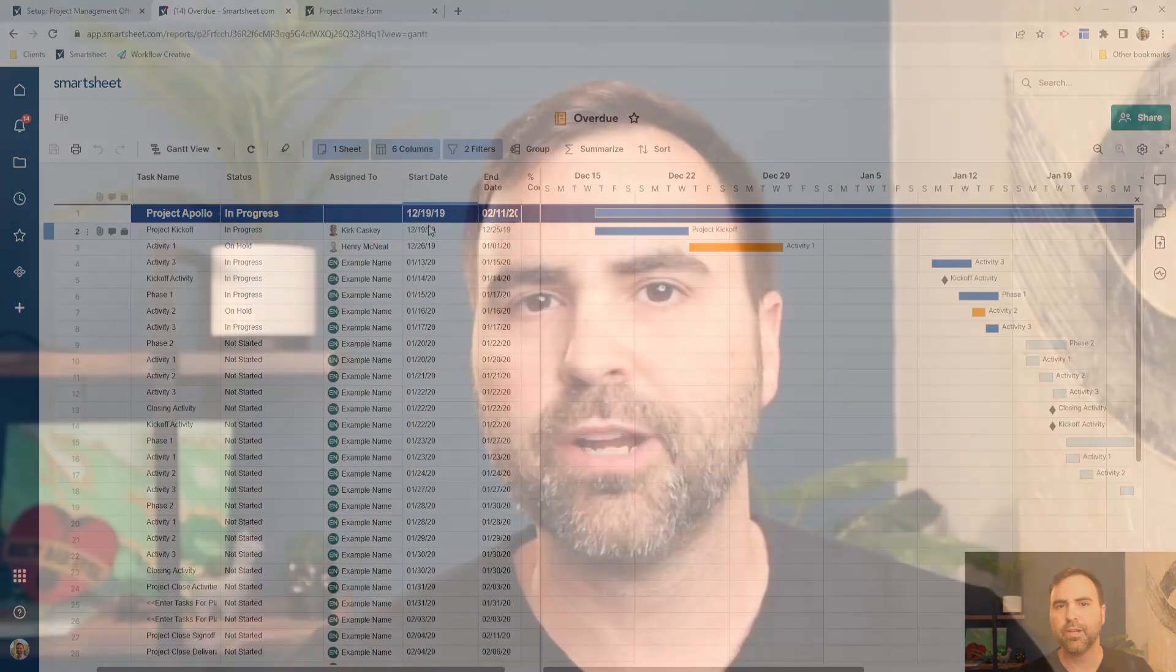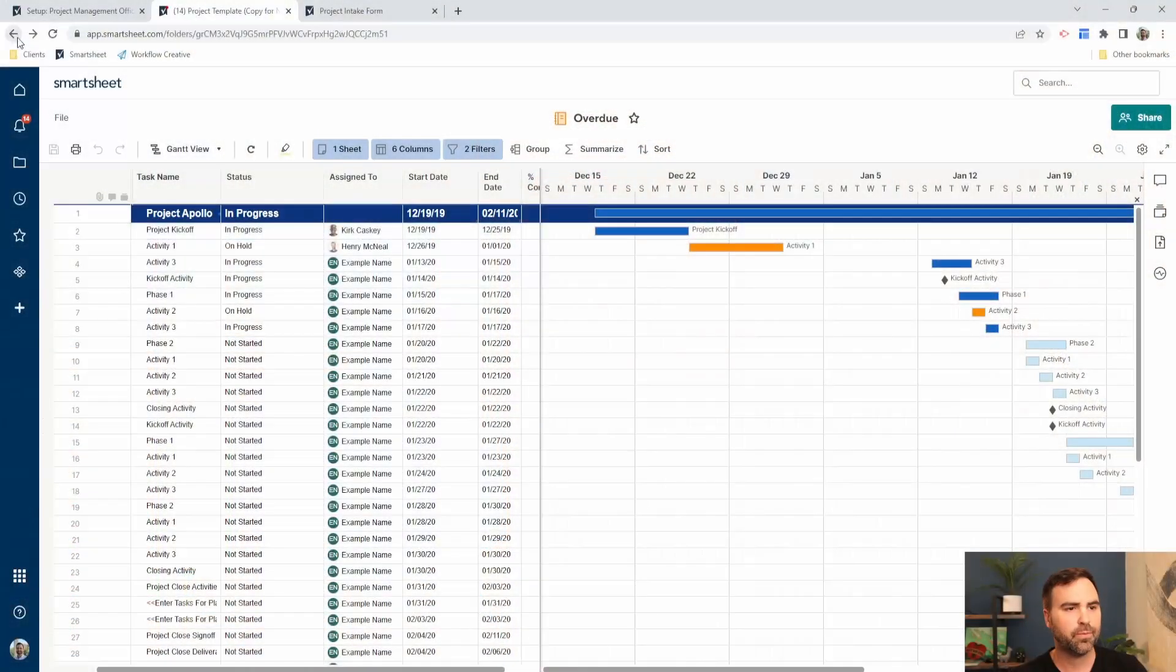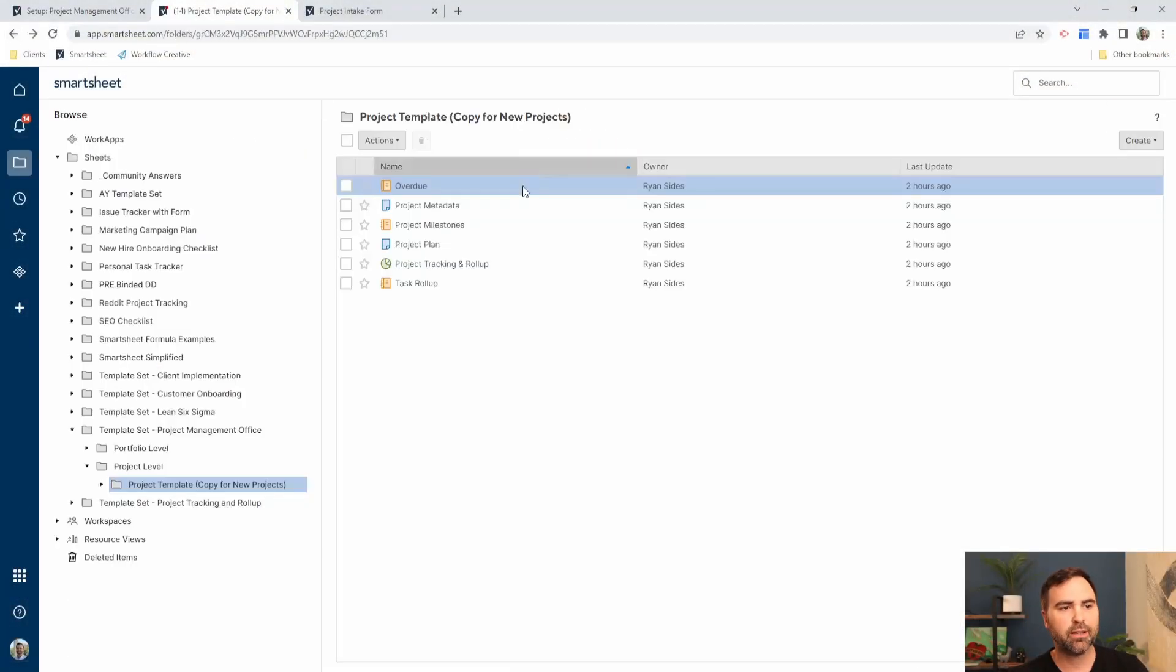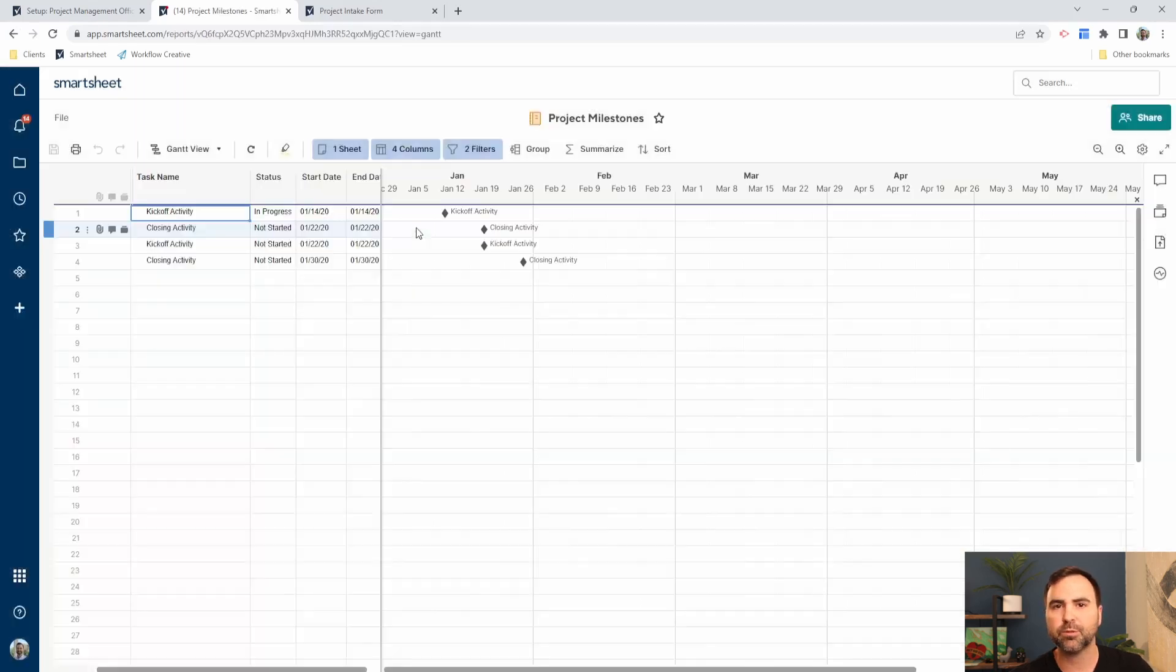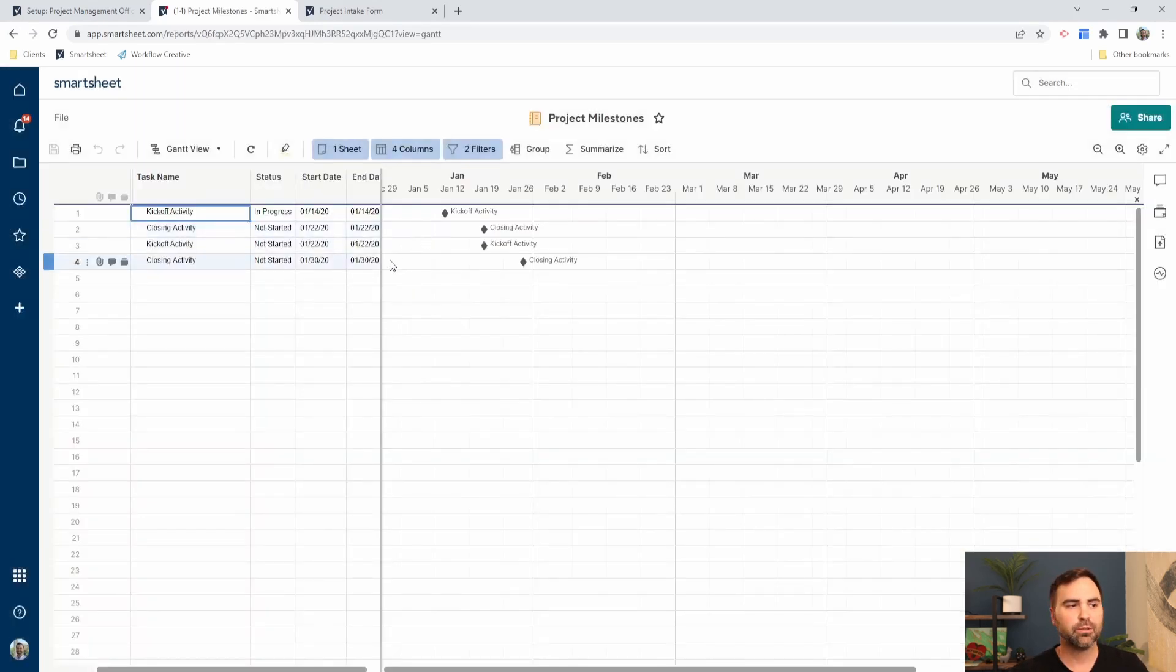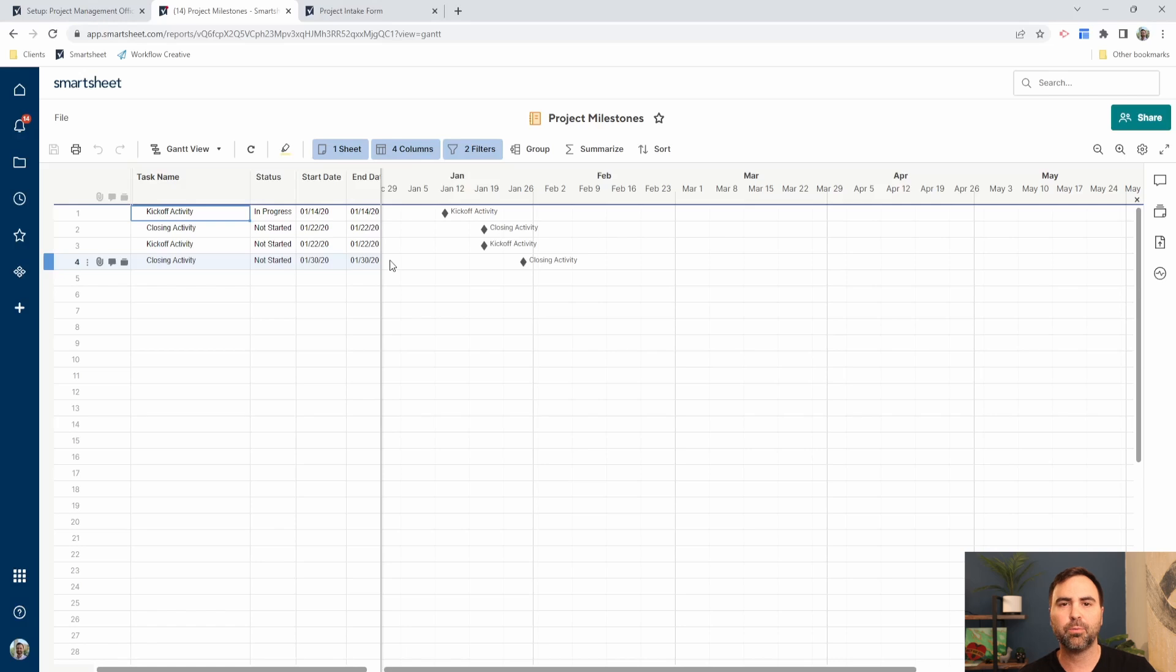Reports are great because you can customize reports for certain audiences or for certain people and show them the data that they need to see without them diving into the project plan, without getting them lost too far down into the weeds into the details. So let me back out. I'm going to go to a different report. This one is my project milestones report. In this case, we have those milestones indicated on our project plan and those are the only things that we want to show up on this report.